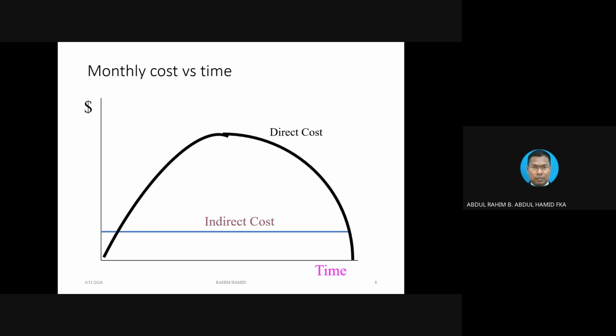One is the extreme point whereby you can complete the project at the longest duration, and another one is at the shortest duration. And along the way, you can see the movement of the graph. But this graph simply reflects the contractor spending. That's what we call monthly costs.